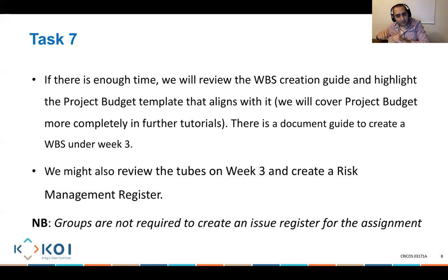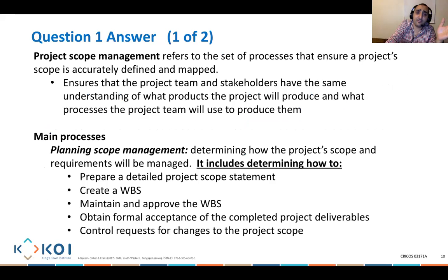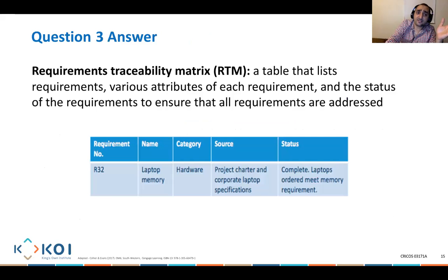Because you put people, you also put how much each person gets paid. And because you could do that, you will get a budget. And that's really the foundation to get everything else that we need for this assignment. Does that make sense? Okay. So guys, I'm trying to simplify things very much for you to go from the high level to all the details.